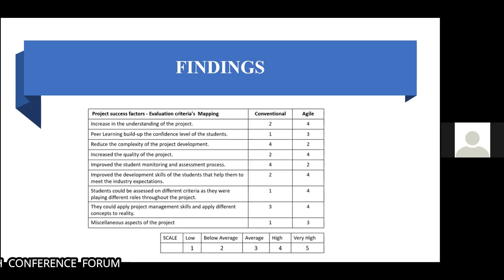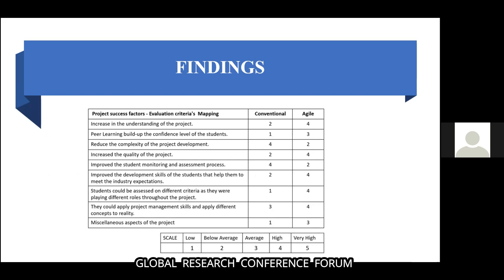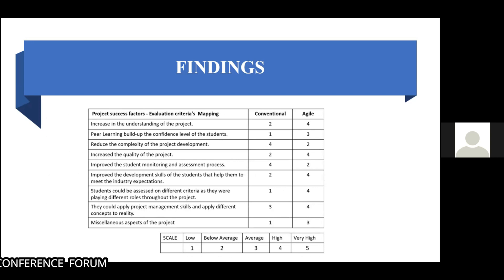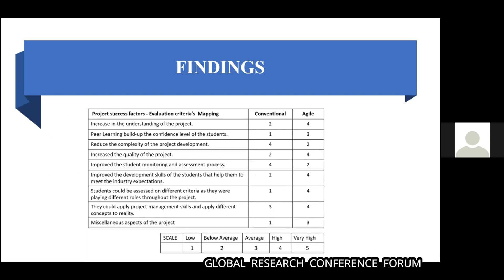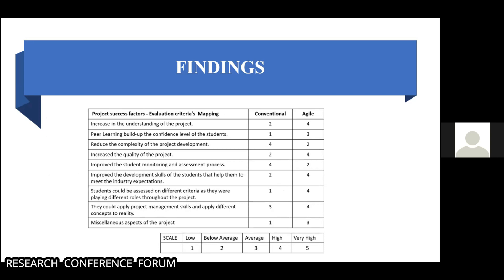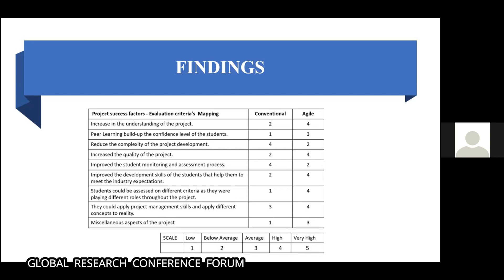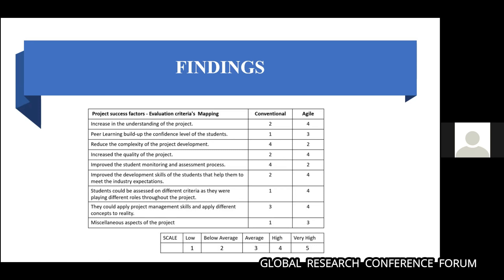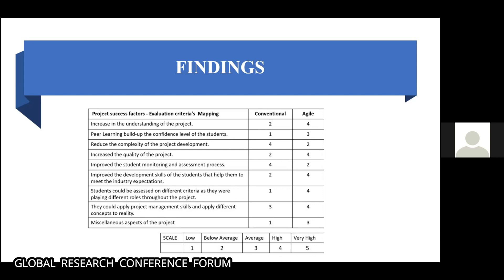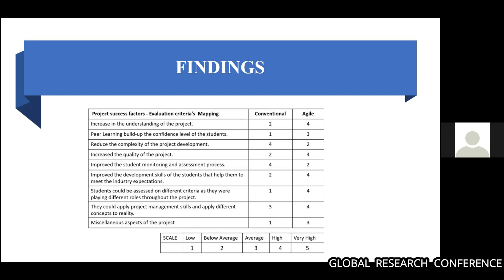Group A and Group B developed projects according to their respective models — linear waterfall and Scrum. Feedback was taken from mentors, and project success factors were evaluated on a scale of one to five. It was found that Agile values were higher than waterfall values, and students accepted the Agile way of developing projects.